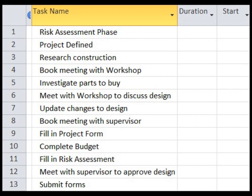Reassess any recommended changes to your design, book a meeting with your supervisor, fill in a risk assessment project form, meet with the supervisor to check and approve forms, and then finally submit the forms.